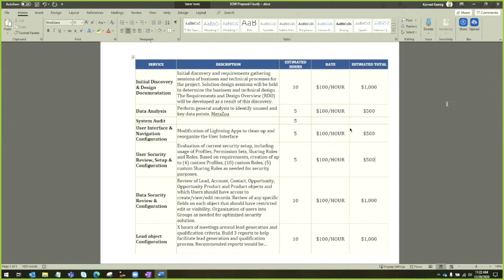So, yeah, I feel like even now, had you presented a price to them at all? No. Okay. So when I do smaller ones, I think I messaged you on this, my smaller stand-up price is usually like $2,500, $3,500. It just makes it so easy for people to bite it off. But then because you're telling them the number of hours on everything, they know if we go over, it might be a couple hundred extra bucks, maybe 500 extra bucks.